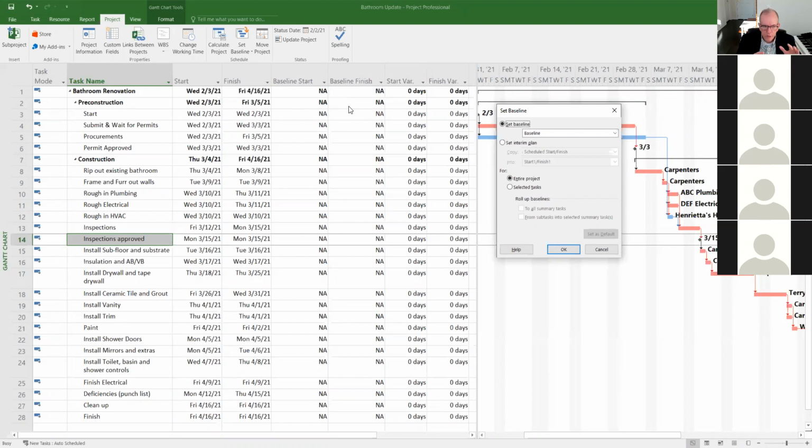So once you're finished the plan and you're happy with all the costs that are applied, then you set the baseline. If you forget to set the baseline, you're going to do the updates, and really it's like you're still working on the plan. It's not going to show you the variances. You're not going to see the differences. You only have to do that once or twice, and then you get fed up, because then you have to go back and zero everything out like I just did, set the baseline, and then put it all back in, which is annoying. So set baseline. It doesn't take long.